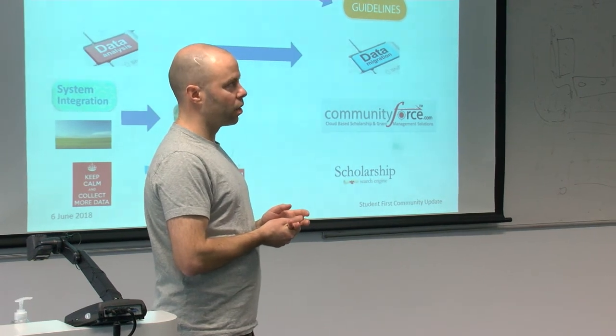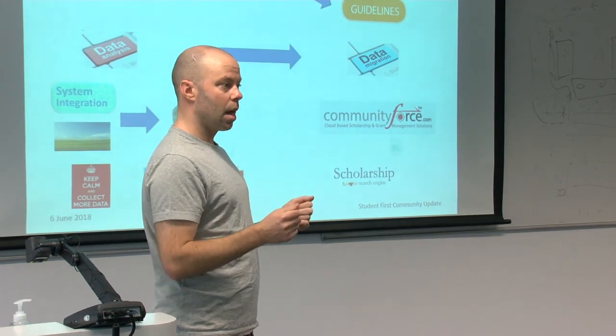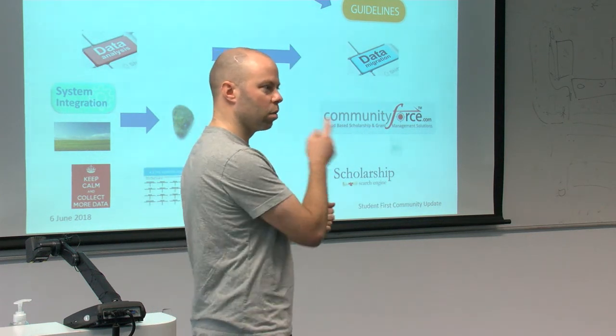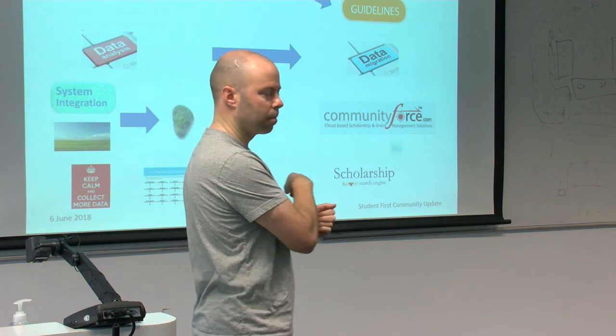Regression testing is where we think, okay, we're pretty good, but because we're getting feedback continuously, we're constantly changing things. So something we thought was good a few weeks ago might have been broken.